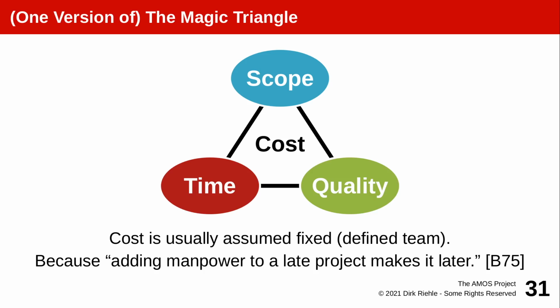using scope and time as fixed. If, however, you say, well, scope is there, so these features are to be done, and we want to reach this particularly high quality, now you have fixed the time. It follows from scope and quality. And you cannot, even if there is a raging product manager, engineering manager who says it needs to be done by the next weekend. If it's not in scope and quality dictates it needs 3 months, then you will not be able to get it done by next weekend, unless you start varying scope or most notably quality. So you pick 2, the third follows, and here in software development we almost always assume fixed costs.